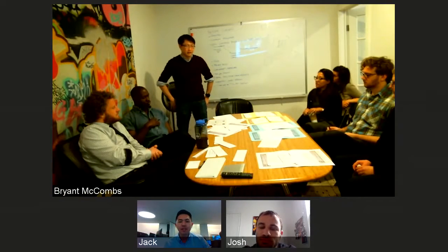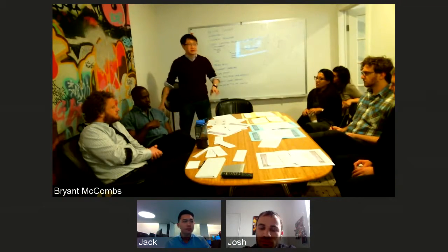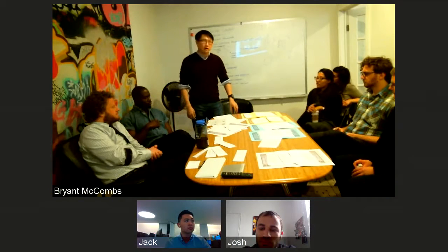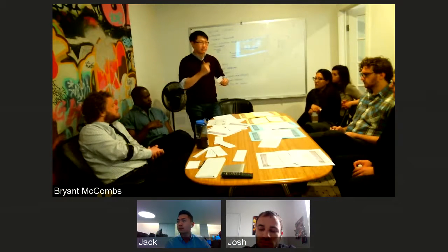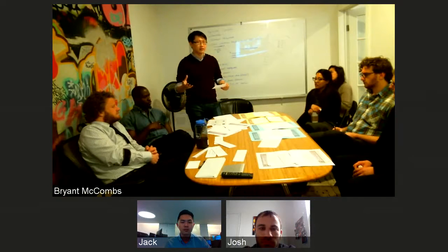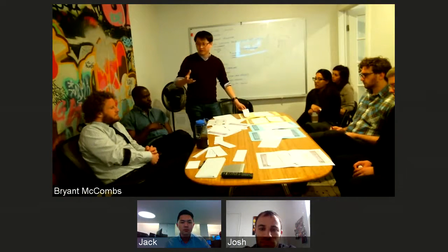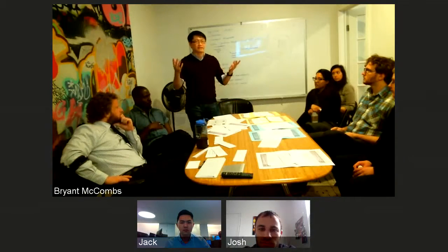There's other parts that are designed to more save you from that. Once again, giving them the fact that this is an estimate, laying out preliminary cards, maybe not necessarily detailed story cards, because that's the other part of this: any story card that is written has to be able to, most of the time, be done within a week of work, be validatable by the information that's on the card by a third party, and I forget. There's a couple of rules for writing a story card. It's not the Mythical Man-Month. I forget the name of the principle, right? You start with, you want to put a man on the moon.